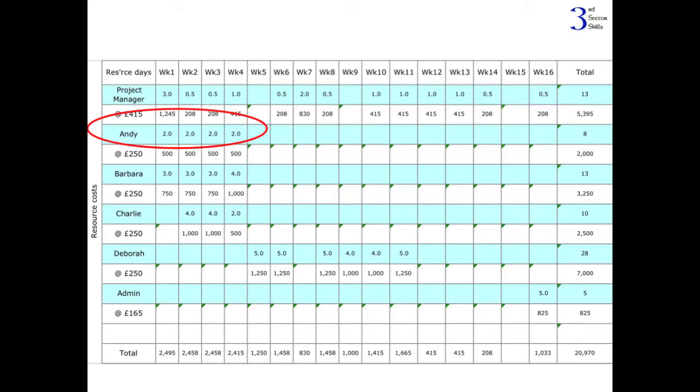And we've done the same for everybody. So here we have Deborah's working pretty full time, you can see through here. Now the white lines here, they show the cost. So we figured out that Andy costs £250 per day. So that's what he costs us, not what we're paying him. Poor Andy. But there you go. This includes all the heating and lighting, all that other good stuff.